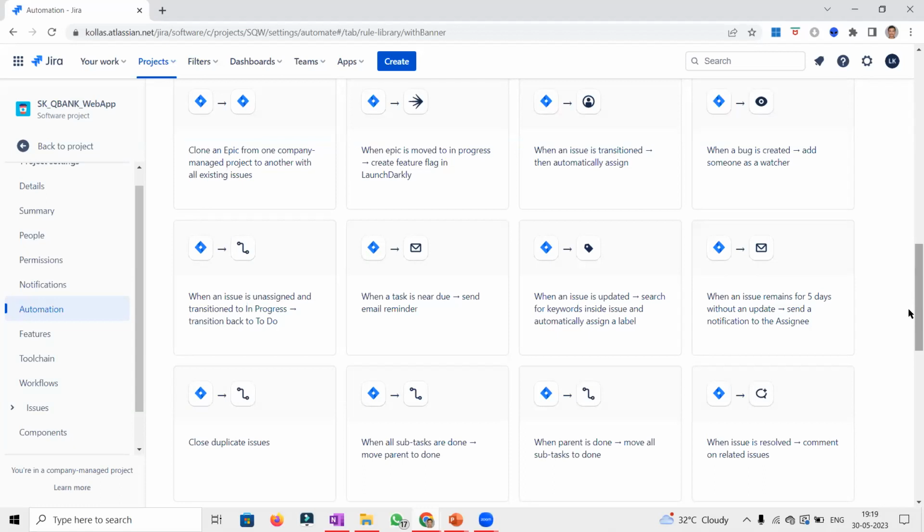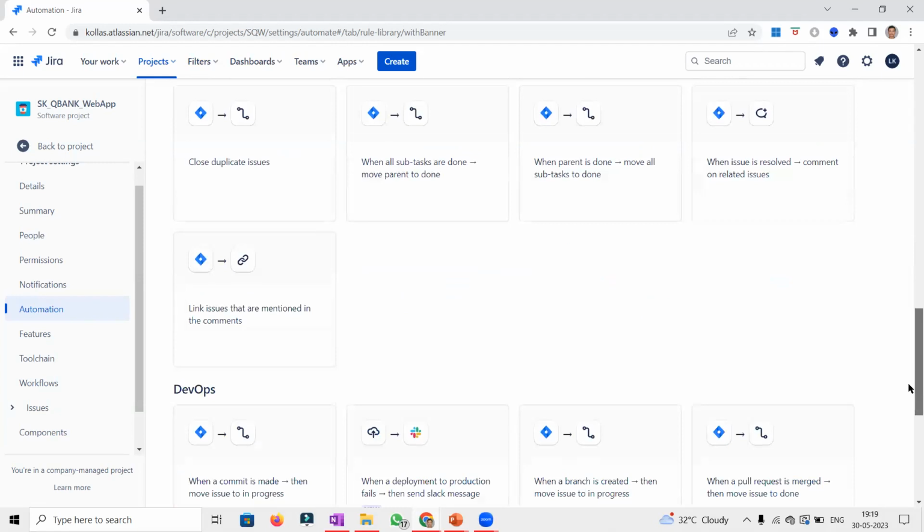So if you are changing the account number on the feature, then it should automatically reflect on all the linked user stories. Basically, all these user automations we are writing are on a similar front. Like when we are closing the feature, then we should close the stories too. Those are very simple, basic automations. Yes, so that's a good starting point.